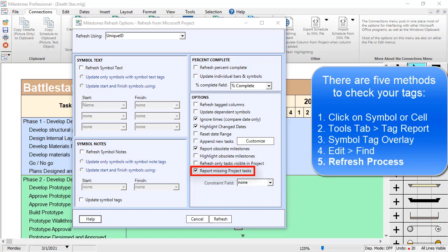Then you also have Report Obsolete Milestones, which lets you know if there are any tasks in Milestones that are not found in the Project file. Both of these options will show you information on the Refresh report, which pops up after the schedule is refreshed.